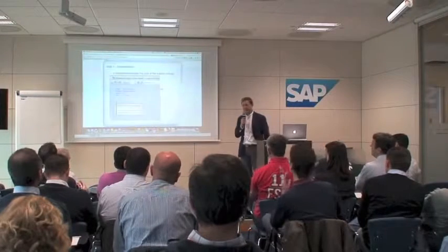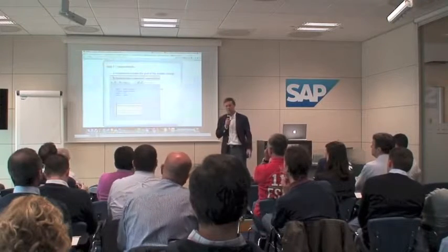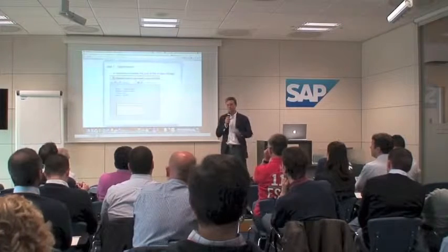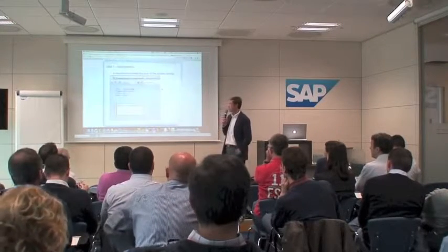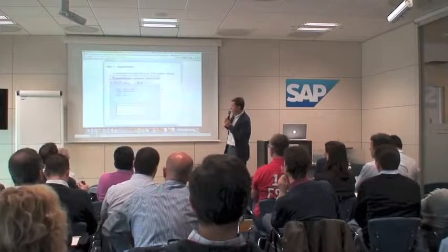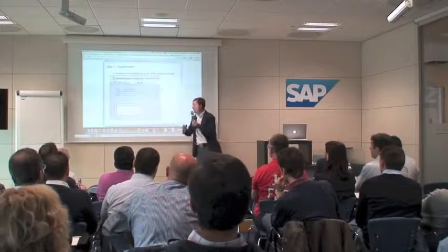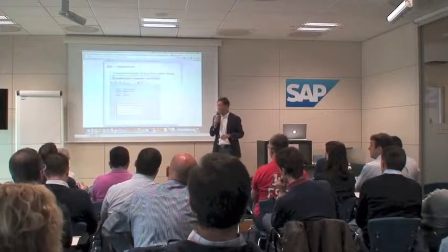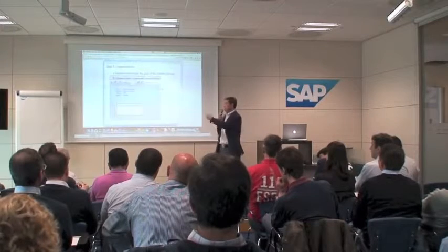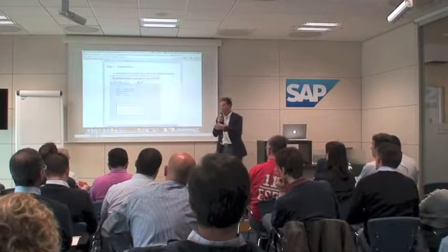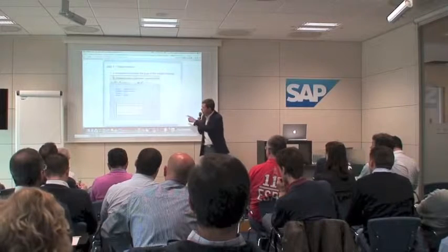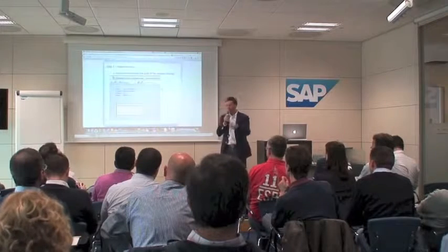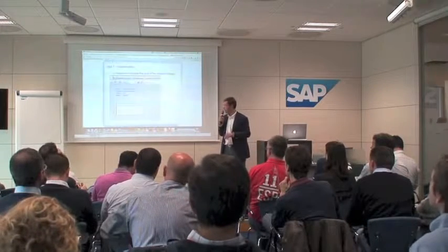Okay, I won't spend time on our UML modeling. The first step is to model a requirement. When someone asks our IT department about something, we create a UML diagram, a simple classifier, and we describe the requirement. The tool that we use performs some automatic numbering, and that number, here 0522, will be one of the tracking keys in the change request system of SAP.